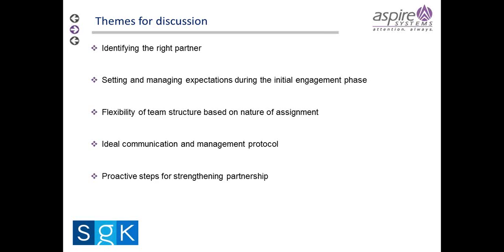Once the majority of the BA work is done, we're probably going to see it shift back to 80-20, and then maybe even further, as we get into heavy development and testing, to 10 onshore and 90 offshore. We're kind of used to that. That's a cadence, and we don't want to lock it down and say it will always be 80-20. We need SGK's management, as well as you guys at Aspire, helping us continually figure out the right balance for utilization. If we've got good utilization and the project's meeting all its deliverables, that doesn't mean it's still going to be true next month. We're going to stay in tune with it, look ahead, and let the onshore-offshore balance evolve with the project.